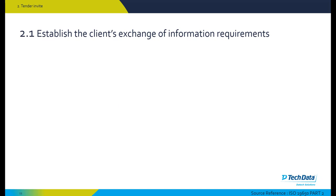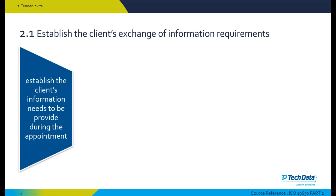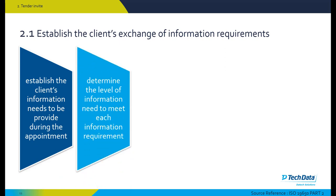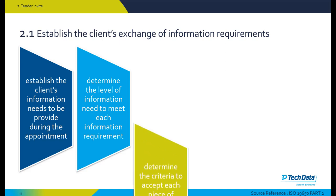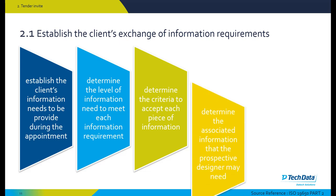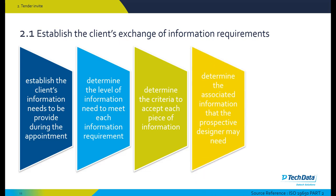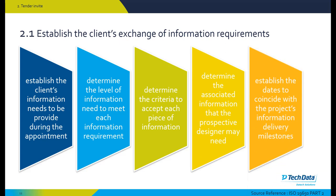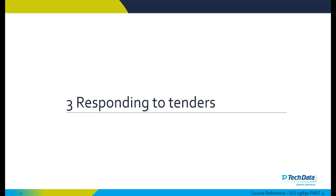At the tender invitation stage, we need to establish the client's exchange of information requirements that needs to be provided during that appointment. At this stage, we also determine the level of information needed to meet each information requirement, criteria to accept a piece of information, determine the associated information that the prospective designer may need, and establish the dates or milestones to coincide with the project's information delivery milestones.